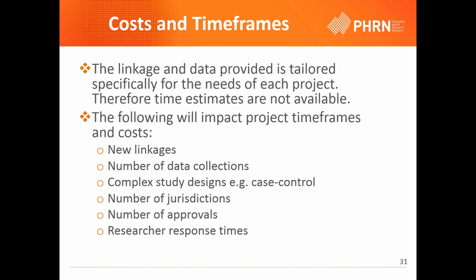And just keep in mind also that the workload of a data linkage unit or an ethics committee, that also can contribute to the time frame. So submitting an application around Christmas time can sometimes be problematic, with staff numbers being lower because staff are on leave. So just thinking about those sorts of things as well, they can contribute to timelines.